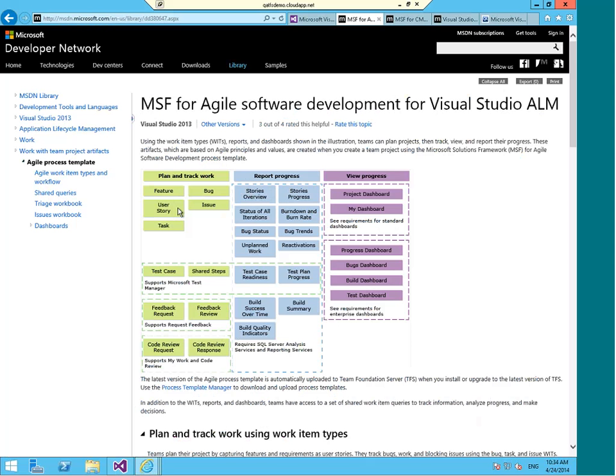Features and user stories are really my starting point with Agile. So in previous versions of this particular process, we didn't really have features, we just had user stories. And user stories could be arranged hierarchically. Features are really big pictures, if you like, of what we want to achieve inside a particular product. And for something that's as small as a DLL, it's perhaps quite likely that in this particular case we're not going to have any features at all.